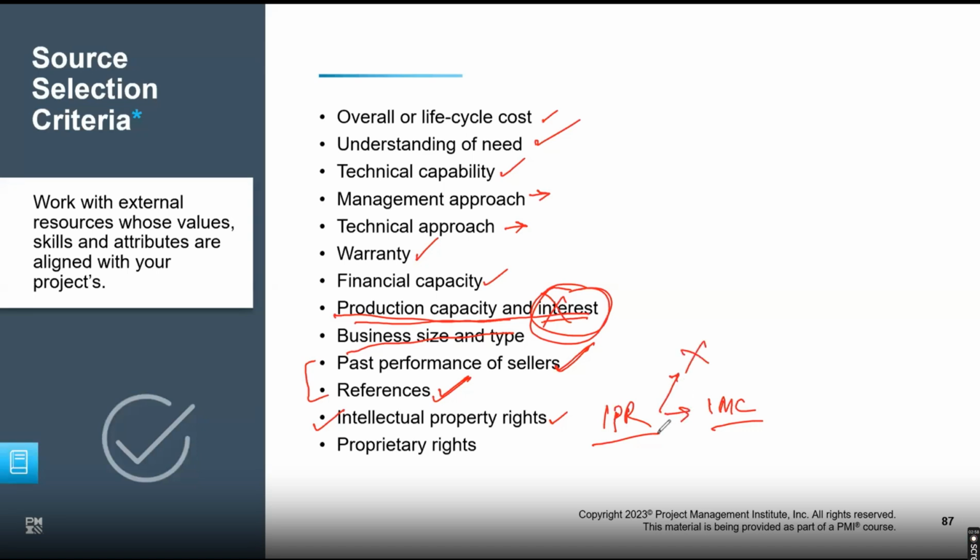Bottom line, it's your contract, your agreement with the vendor. You decide whether you're going to let go, because when you leave your intellectual property rights, you are giving them the authority to use it at their discretion, and you will not hold them accountable or claim anything there. When I deal with corporates, they ask for recordings. I say okay, there will be a separate charge for that. We will get the training done, but there will be a separate charge for getting you the recording, because if you want me to release my IPR, I'll have to charge you for that also.